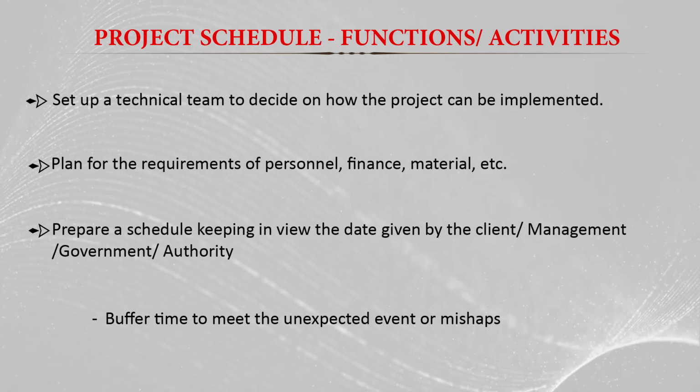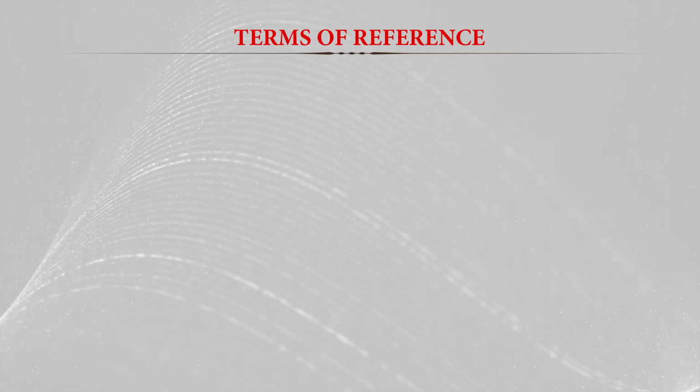Sometimes we have to give this buffer time because there is sometimes a delay in the supply of raw material due to weather conditions or some mishappening, some accidents. That's why we always have to provide some buffer time. That is better to achieve the project outcome. And then we will move to the terms of reference.